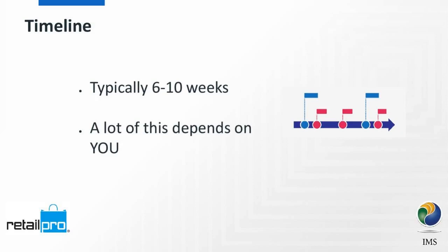There's a number of hours of training that we can't make take any less time. And then there's just many other aspects of the project, anything from what type of business you're in to how many locations you have, right? If you're a single store that sells 100 SKUs and your data's clean in version 9, sure, you can be way on the bottom end of that timeline. But if you've got multiple locations and version 8 data that needs DVS and cleanup, you need to spread out the training over the course of several weeks, right? Then it's going to take longer.